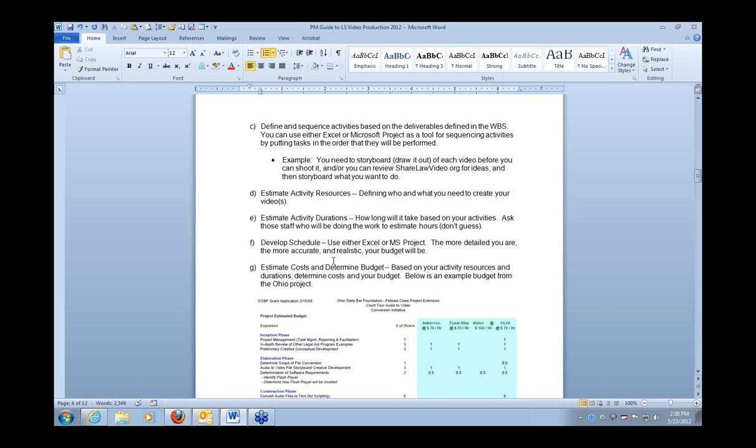And I'm going to stop for just a second and talk about durations and resources in general to project management. When a project is underway, or it's going to be underway, somebody walks up to you and says, how long do you think it's going to take us to do our 10 videos? I need to have an idea for a budget. I won't hold you to it, but I want an idea of a budget. You can say, well, let me define the tasks, the deliverables, the tasks, and get an estimate of how long that may take based on resources, and I'll get back to you on that.